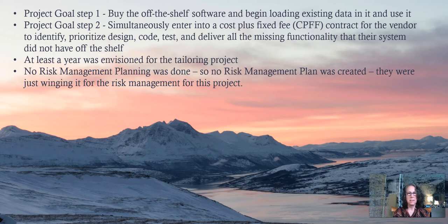So simultaneously, they would keep running their existing system, and they would engage in what they were calling a gap analysis project, under a cost plus fixed fee contract with the same vendor, to identify the gaps.